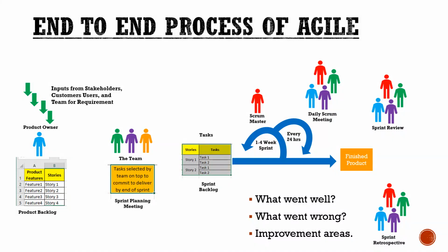Based on that, you will assign the user stories and tasks, everything, in the sprint. And the scrum master and everybody in the team will decide, in a sprint planning meeting, who will take what task, and what time period we have to deliver the software within the sprint, within the 2 weeks or 4 weeks of the sprint. What stories we plan to deliver in the sprint, that is what we do in the agile process. We do sprint planning initially.